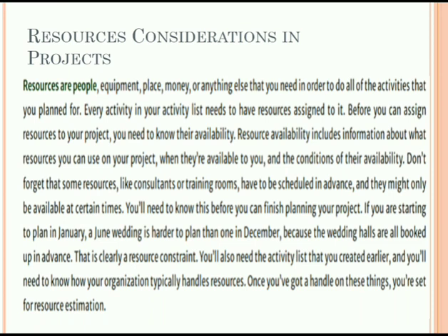Bottom up estimating is a very accurate measure of estimating, provided that the estimates at the schedule activity level are accurate. However, it takes a considerable amount of time to perform, because every activity that is to be included in the bottom up calculations must be assessed and estimated accurately. The smaller and more detailed the activity, the greater the accuracy and the cost of this technique.